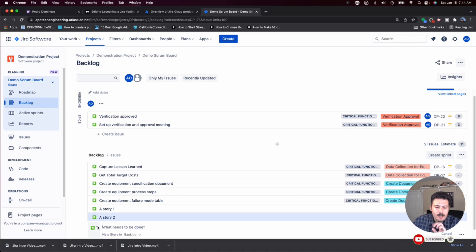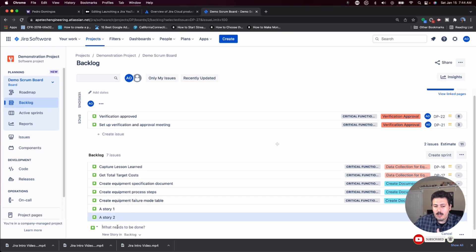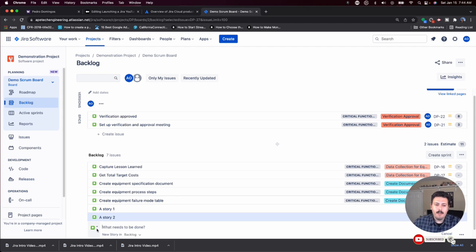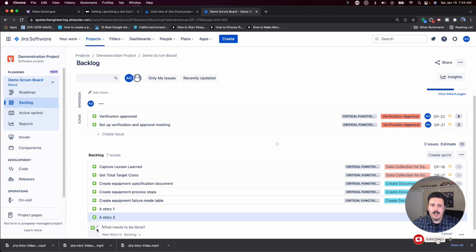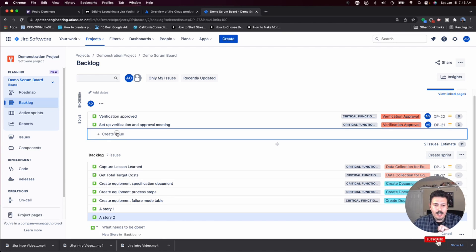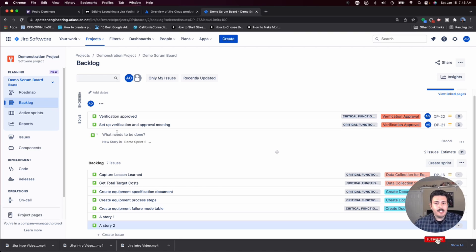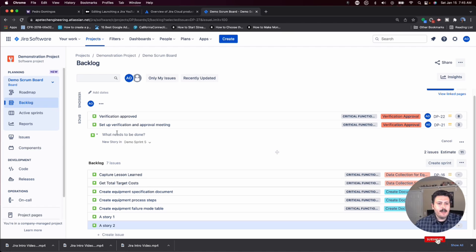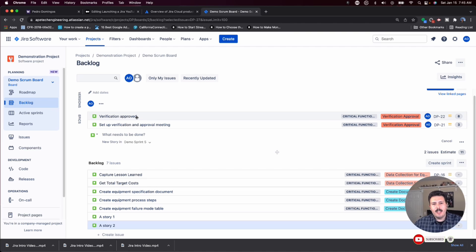Two, I don't know if you saw this, but very subtly you can pick between a story, task, or bug and then click the enter button after you give it a title. So you actually can pick the issue type, but because you're in this backlog view and this is really for you to manage your sprints, you're only going to be able to create stories, tasks, or bugs. You won't be able to create epics and you really won't be able to create subtasks, although you couldn't create it in the previous method either. When you're in this backlog view, you can create issues up here, but I recommend that you are in an active sprint planning mode, as in you're trying to plan your next sprint. Otherwise, this might just get a little bit out of hand. You want to make sure that when you're creating issues here, you're at least in the team setting so that people understand why you're creating these issues and why they're going into a particular sprint versus if you're just adding to the backlog, you're just adding technical debt to yourself. That's method number two.